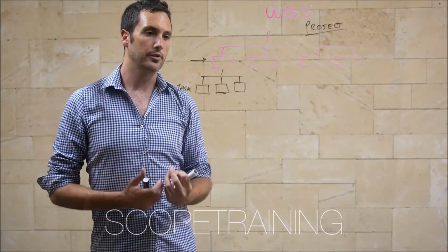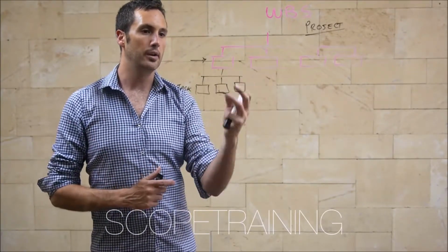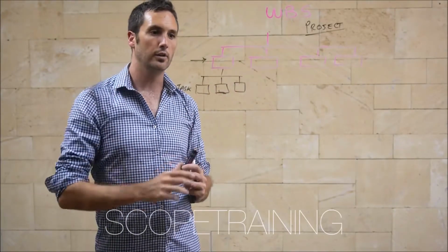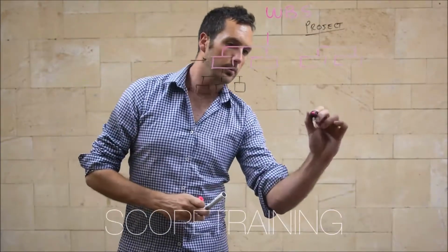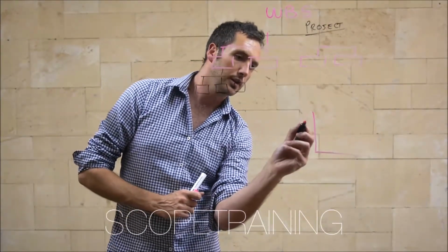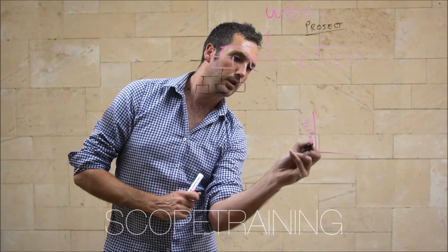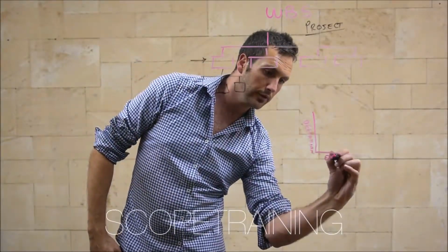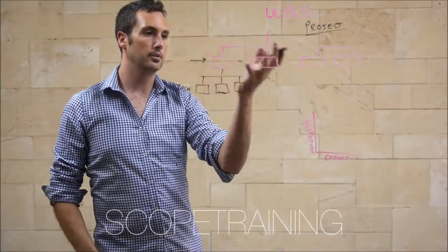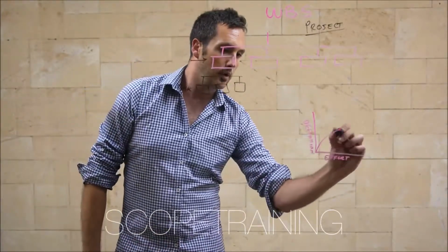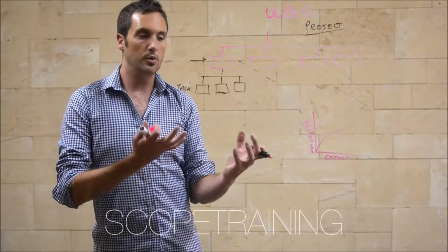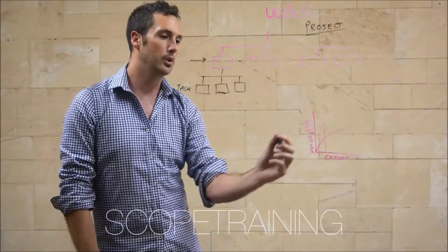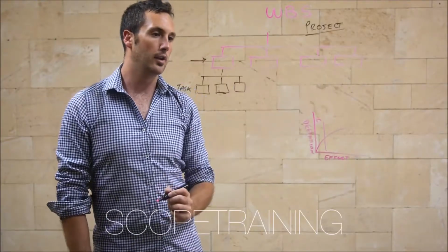At a high level, this would be your work breakdown structure. And your work breakdown structure is something that will be progressively elaborated as you go through the project. If you look at the other video on the cycle of scope management, I drew a little graph that illustrated the degree of definition, which in this case might be the depth of the work breakdown structure, versus the effort required to break it down to that level. And what you'll find at different points in the project, you'll need to do different things. Usually in the concept phase, you can probably get away with a high level work breakdown structure.